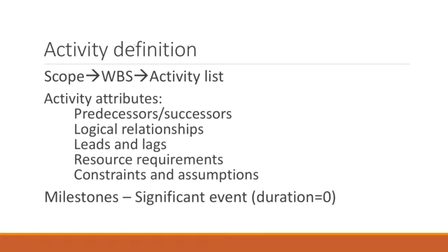with the project charter. So the project charter is usually really useful because it gives us the start and an end date on a particular project. That's the first set of data that we have. Then we take that project charter, and based on the project charter, we are able to create the project scope management. And the project scope management, in order to create it, includes the idea of a work breakdown structure, and then trying to define all the possible work packages that are needed in order to complete your project.